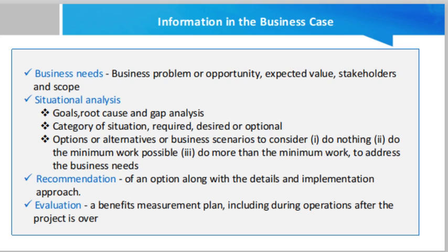The business case, which is first developed during the project initiation phase, contains much more detail. It should be reviewed by the project sponsor and key stakeholders before being accepted, rejected, cancelled, deferred, or revised. Depending on the scale of the business change, the business case may need further development as part of a detailed investigation. Therefore, it should be developed incrementally so that time and resources are not unnecessarily wasted on the impractical.